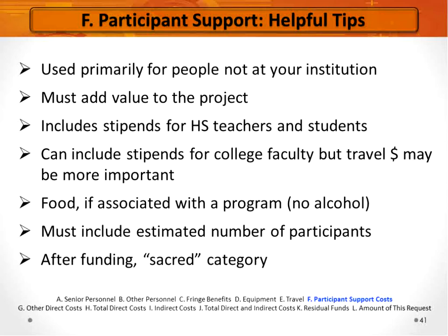So you put in that request, and I think as long as it's reasonable, your program officer is going to recommend approval of this, but it is something you want to be aware of that you do need to do. Now let's say you had 25 people and you end up with 45 people each summer. No problem with you and your financial people moving funds from other lines on your budget into participant support. It's only if you want to take money out of participant support. And that really is the only line that NSF has any authority over.